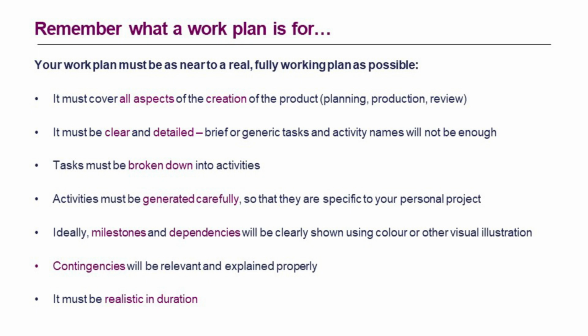Tasks must be broken down into activities, and these should have some detail to them. These activities must be generated carefully so that they're very specific. Pick out the particular elements of your personal project that you're going to have to do and write those down as your activities. Ideally, milestones and dependencies will be clearly shown somehow. This might be through using colour or another type of visual illustration. Contingencies will be relevant and explained properly, not just a column that says contingency and doesn't explain what they're for. It must be realistic in duration.